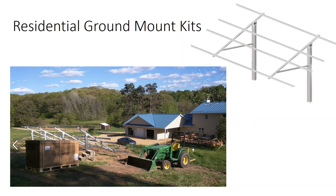But on this project, that residential off-grid project was an $80,000 project on very slim margins. I kind of gave them a discount because I'd never done a design of that magnitude before for off-grid. So when you're looking at about 80 grand to go off-grid, that customer was building a new home. It would have cost him $30,000 just to bring the power out to his property. So he already knew he was going to do solar, and part of that cost was the solar array.